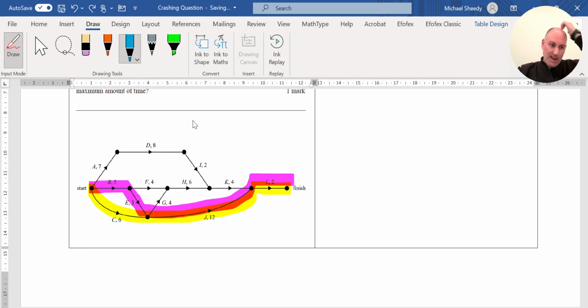Now, from that, what we do notice is if I was to move forward through these 2 critical paths, I will have a 5 here, and coming through C, I can either get to that vertex in a 6 or a 5 plus a 3, which would be 8, the highest.